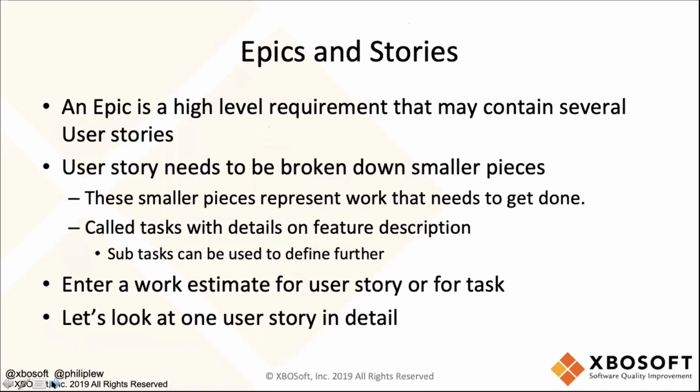An epic is a high-level requirement that may contain several user stories, and in order to make it more understandable, we like to break down an epic into several user stories. But we also like to break down user stories into smaller pieces of work as well, and we call those tasks.